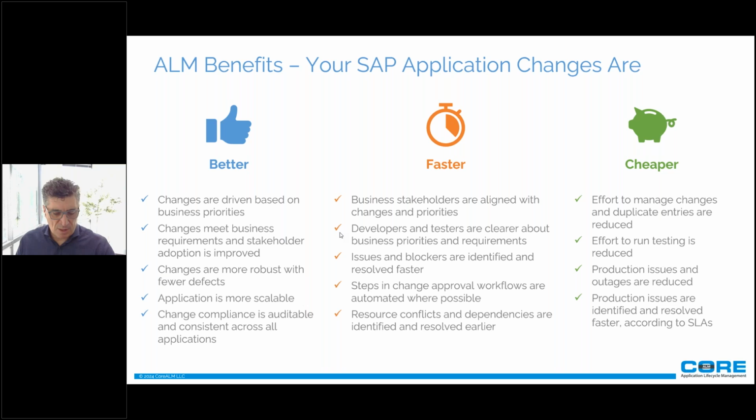Better is really, I think of a test case as kind of like a contract between the SAP project team and the business as to what they're going to get at the end of the day. So they should be looking at those test cases, approving those test cases before the team goes ahead to execute them. By doing that, we're setting very clear expectations of what they're going to get at the end of the day. That should happen during the design process, but it should continue all the way through testing. So better means better quality, so the stakeholders and the business itself get the changes that they want to get.